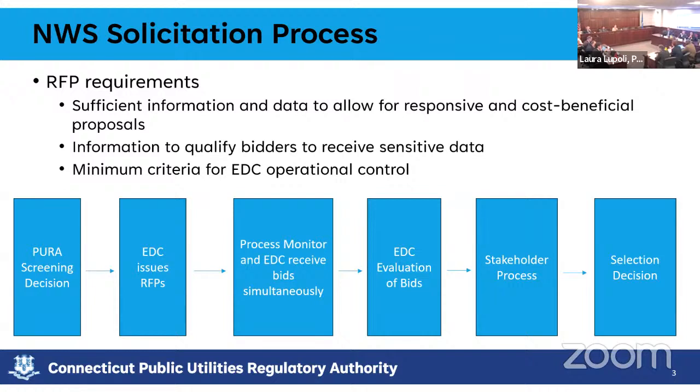Right. Okay. And sorry, could you say again the megawatt cutoff there? It's 1 megawatt for the ISO, the I-39 process. Any DER that's 1 megawatt or above would be considered for the ISO process. It could be level 0, where it's a review, or level 3, where it's an actual study. But if it's 1 megawatt and above, it does get wrapped up in that process. And the ISO has now changed their process: they're doing cluster studies and grouping all the DER in those affected system operator studies together.